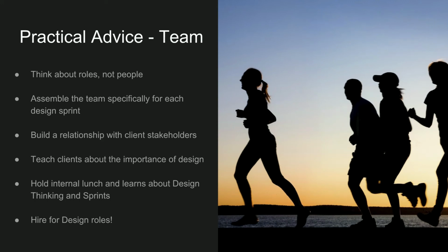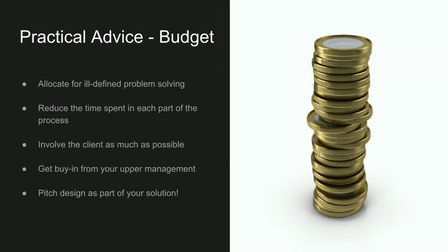So these will build your team out with a stronger design muscle, right? And it's going to be embedded in your organization from that perspective. In terms of budget, it's very important, at the beginning, when you are at the proposal level, to collect feedback from engineering so that you can immediately see what the big challenges are and which areas of the project will be design worthy. And then as you make the proposal, already account for it.